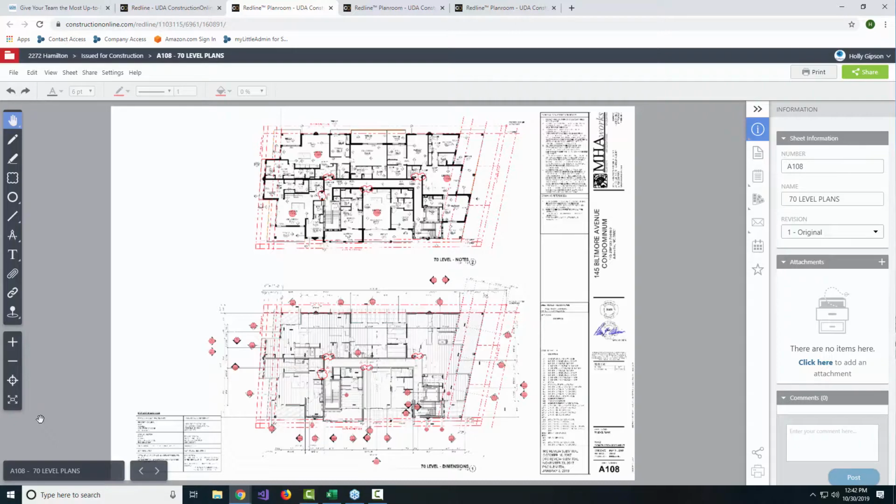I started doing some of the math and thought, well, okay, I wonder if I could assume maybe 2 or 3 minutes per callout. Maybe if they got on a roll, they could do it in 2 or 3 minutes per. Even still, with 3 minutes times 1,200, that's longer than a work week. That's somebody's full-time job for a whole week, and that's not really even giving them a whole lot of breaks. This guy's not drinking coffee. He's not going out for lunch. He's not doing anything. He's just sitting and making callouts all day, and that can get really expensive.